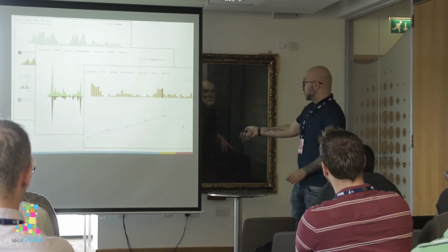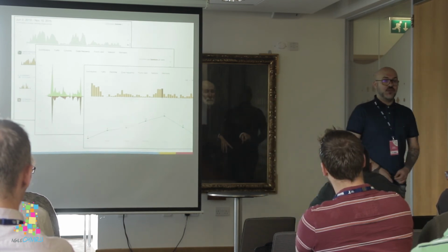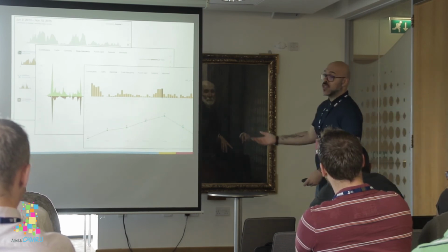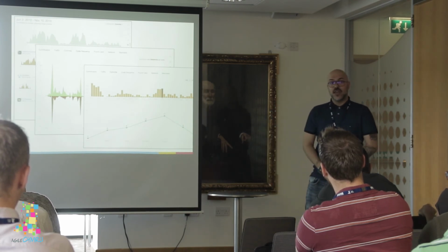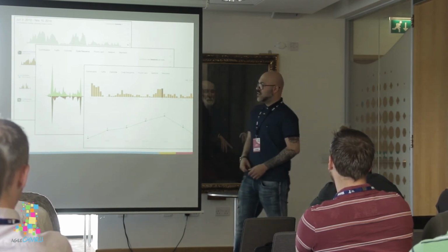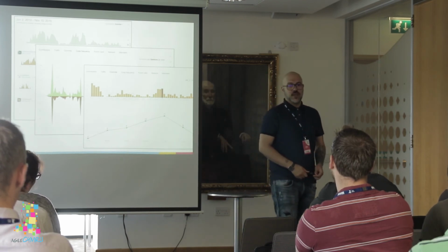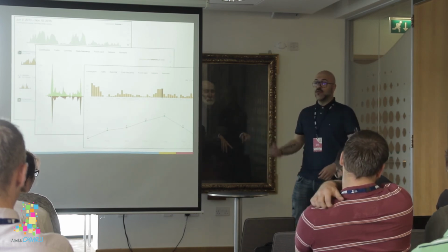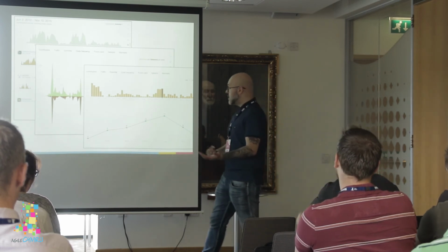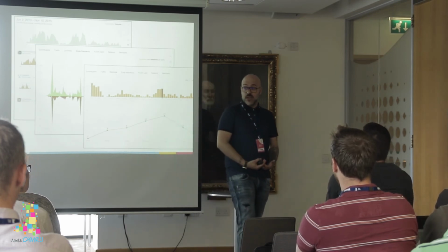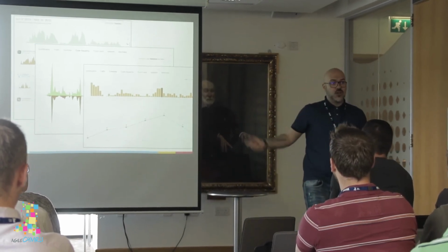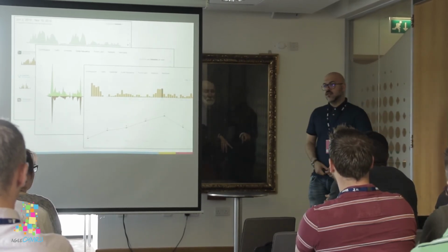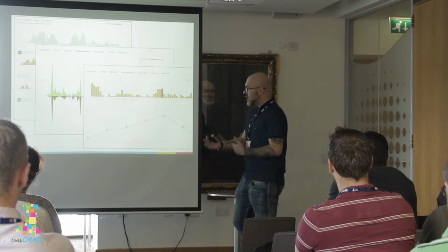From these metrics, you can understand if the story is too big, because if they release or push the code not every day but every 3-4 days, probably the story is too big. So you can immediately say, okay, the guys are not pushing the code often, and if they don't push the code often, it means that they will spend more time on fixing bugs or other issues when they merge the code with other branches. So probably from here you can understand immediately, okay, let's check the story size. Let's see if we can split them down, and you can adjust the velocity.